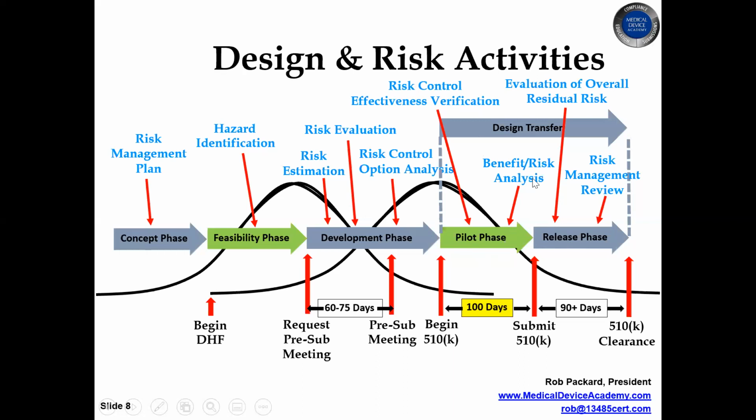We used to call it a risk benefit analysis. A lot of companies say we don't need to do it because the device has acceptable risks, but the Europeans require you to do a benefit risk analysis for all risks, not just the ones that aren't acceptable. So you have to do that benefit risk analysis, and then once you finish your verification, then you're going to do validation. And if your validation requires a clinical study, you're going to have to release it out into the field. So that's why we call this the release phase.